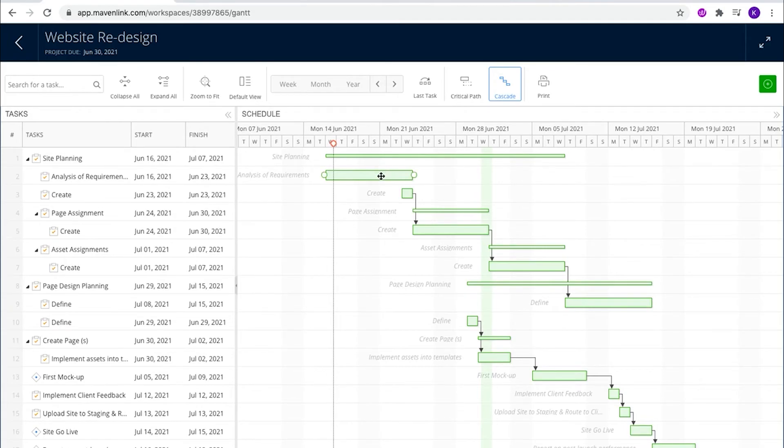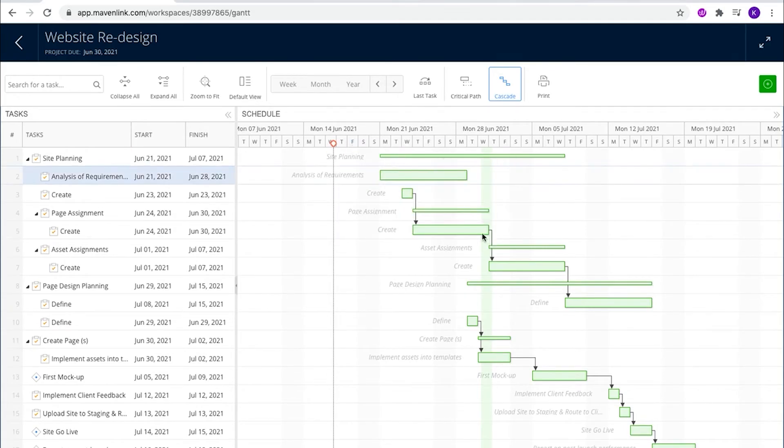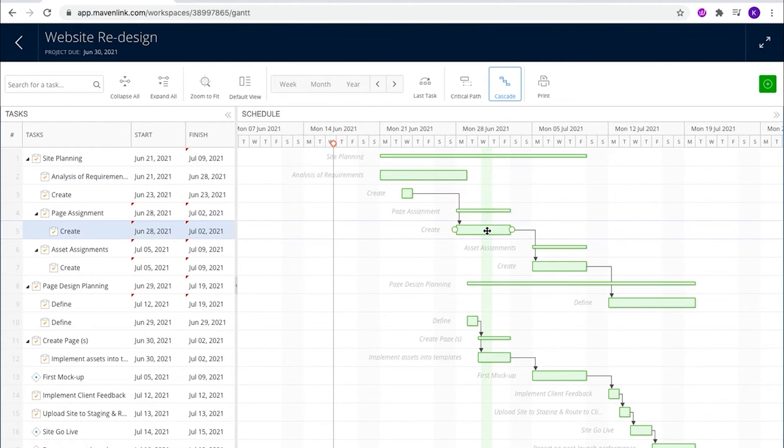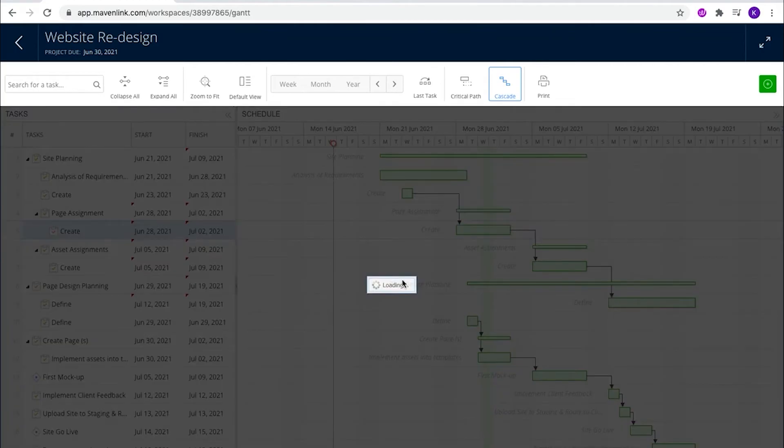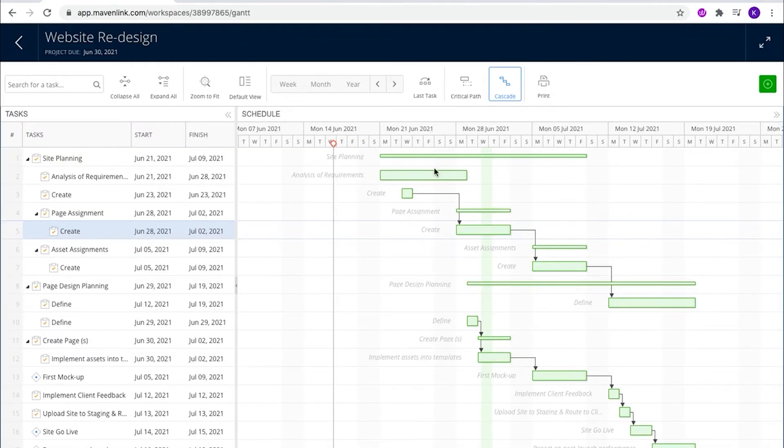If you open up the Gantt chart, moving tasks can automatically change the due dates for everything else if they're on a cascade.